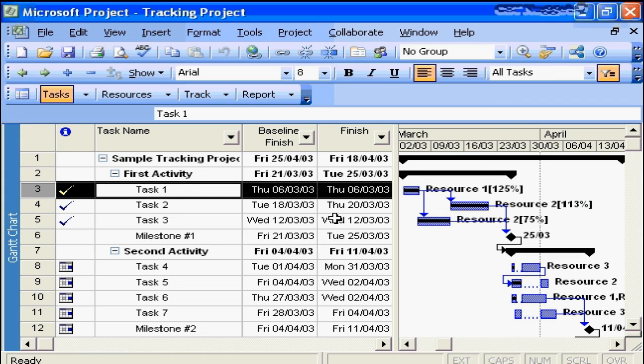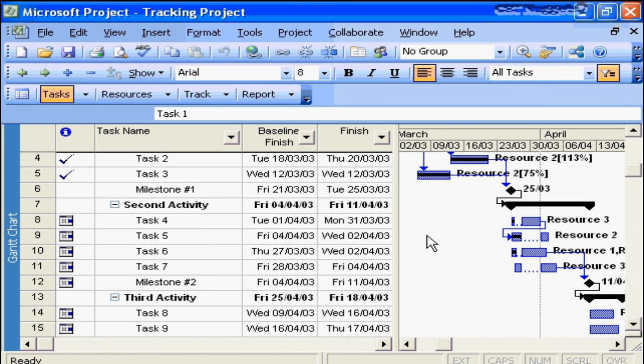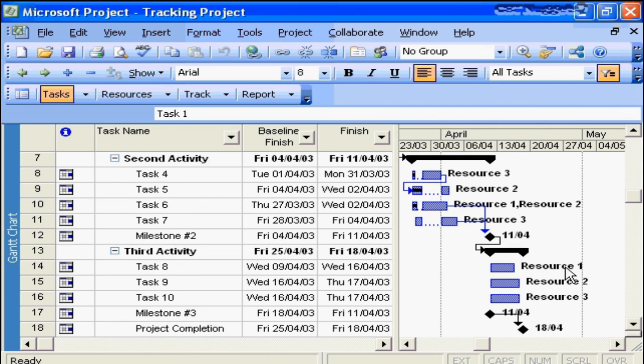project is delayed. As you saw with a little bit of aggression in Microsoft Project, on this relatively short project, we were able to change our finish date from approximately a week and a half late to now where it is approximately a week early. Yes, by doing these tasks in parallel as opposed to serially, we may have introduced some risk. We may have introduced extra communications channels, but that is a consideration we are willing to manage as the project manager to try to deliver this project on time.